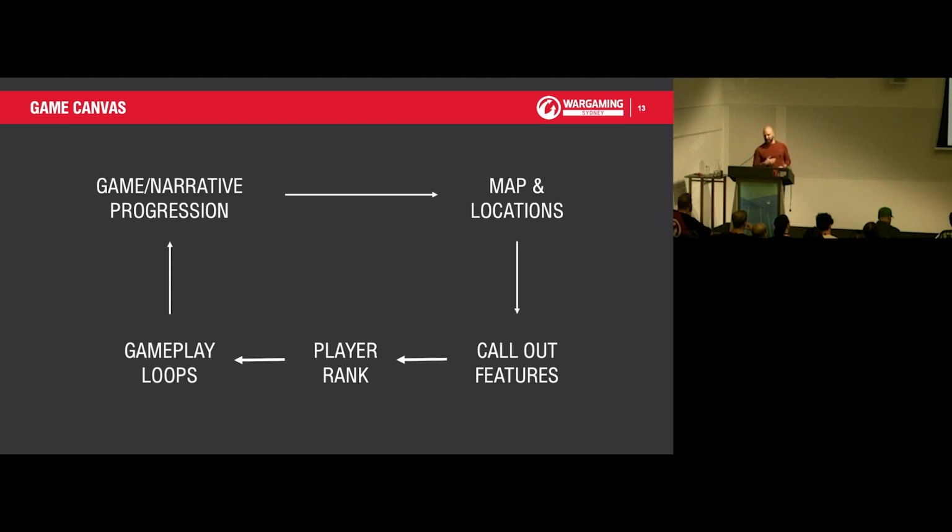This approach really altered the way we worked at Kennedy Miller Mitchell. I didn't abandon traditional design documentation, but instead of writing a single huge one document to rule them all, I broke them down into smaller feature specifications, which we kept on a wiki for easy access and much better tracking of changes. It also allowed that work to be distributed more easily, so members of the design team or feature teams could own a particular area.